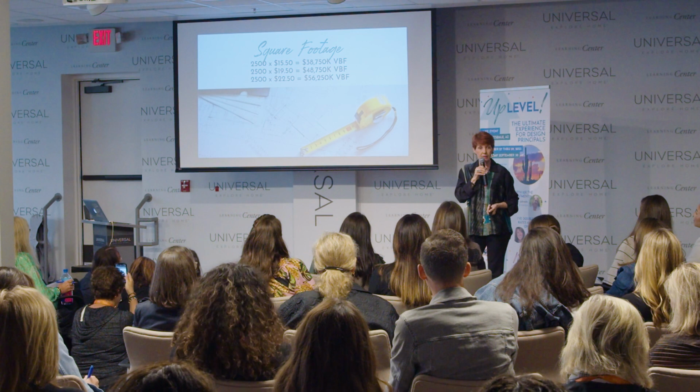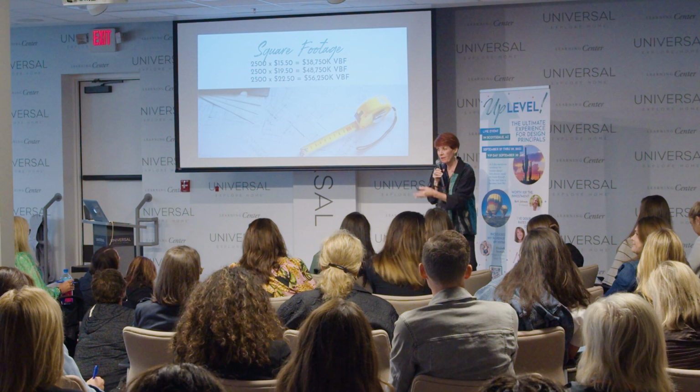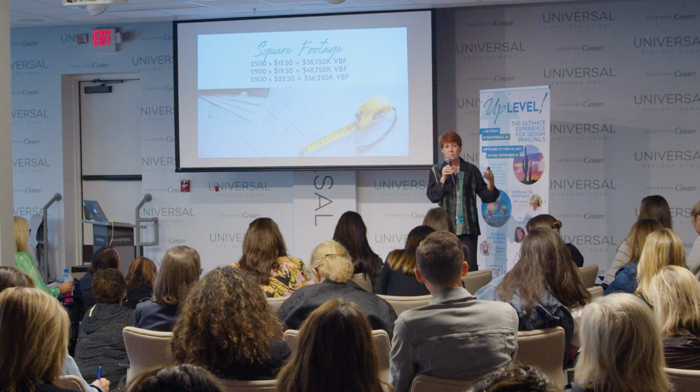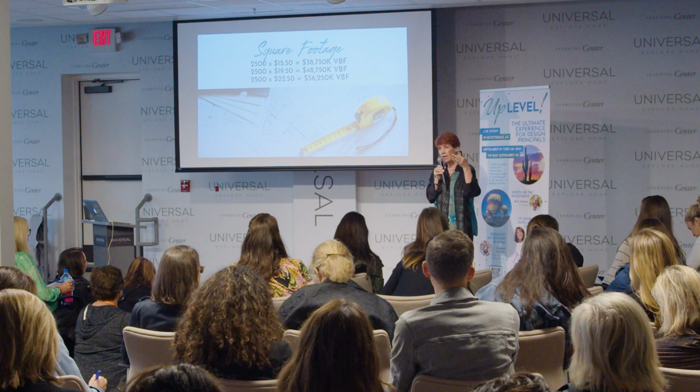And then the way you're going to get this is if it's strictly your design fee, you get 50% up front to launch and 50% before presentation. Before. I cannot stress that enough. Before presentation. And then your procurement management can be invoiced with every furnishings invoice. Okay? You need to be paid in full for services and product before installation, never after.